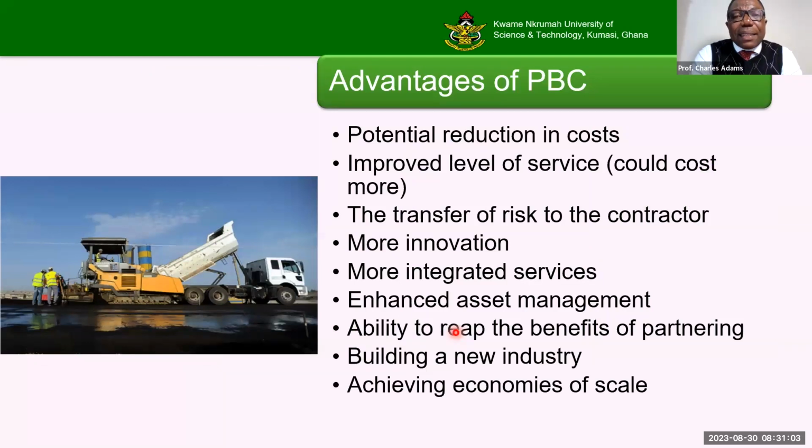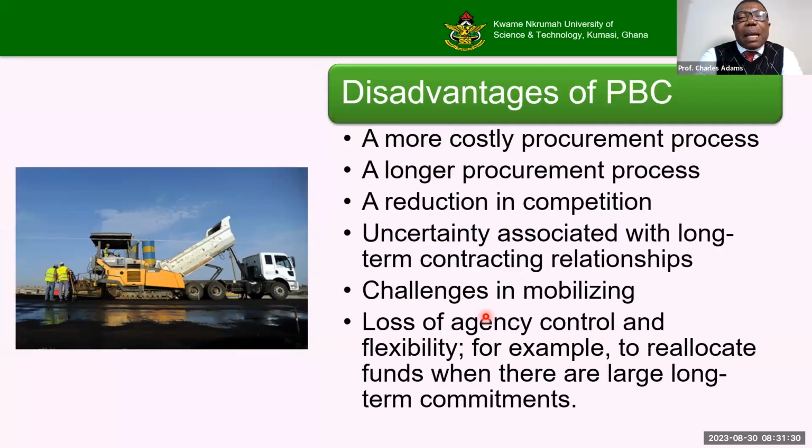Some of the advantages: potential reduction in cost has been established, improved level of service, transfer of risk to the contractor, more innovation, more integrated services, enhanced asset management, ability to reap the benefits of partnering between contractor and client, building a new industry, and achieving economies of scale so that you get a better network. Some disadvantages: the procurement process is long and costly. Getting contractors to make that commitment is difficult. Reduction in competition, uncertainties, challenges, and so on.